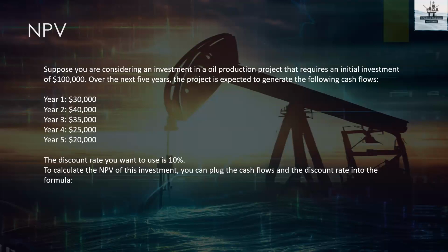But always the money value will reduce as years pass. Imagine with some predictions, you got the information that every year the money will be reducing by 10%. So you need to adjust the values of your outcomes at every end of year with your discount rate, that is 10%. Then the value of the first year will not be equivalent to $30,000, but it will be 10% less than $30,000.